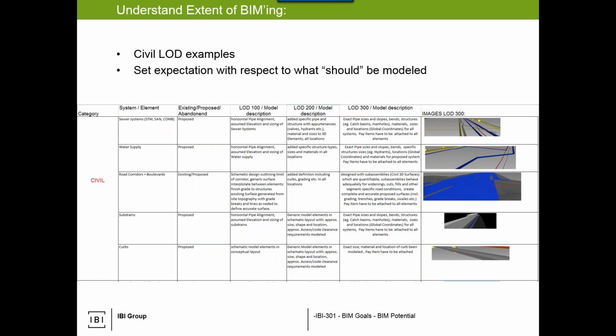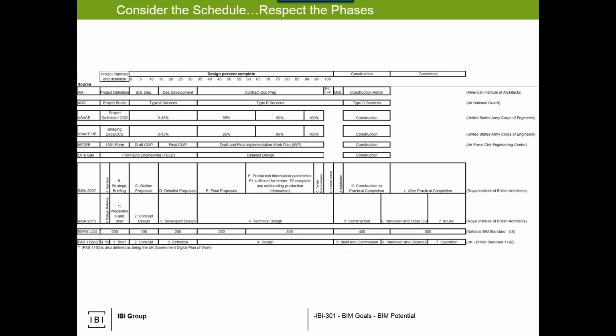It was to help build a comfort level over the level of detail and the expectation of what LOD 300 meant, so that as we started to produce our models, we had a clearer understanding between us and the contractor. There's a lot to this slide, but it might be good, especially on VB or P3 projects, to sit down and go through some of these and say, show me an example of an LOD 300 wall. Do you think of it in the same manner as I do?